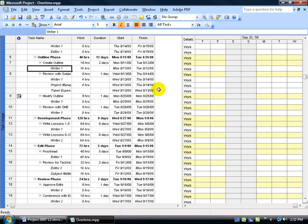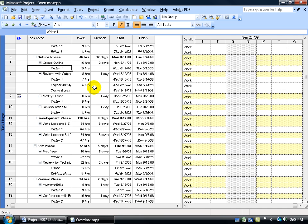You could ask can I insert the overtime column into any view? Yes you can, but the only views that allow you to enter in any information within that column are the task usage view and the resource usage view. The split window doesn't have these columns and we'll cover that later.